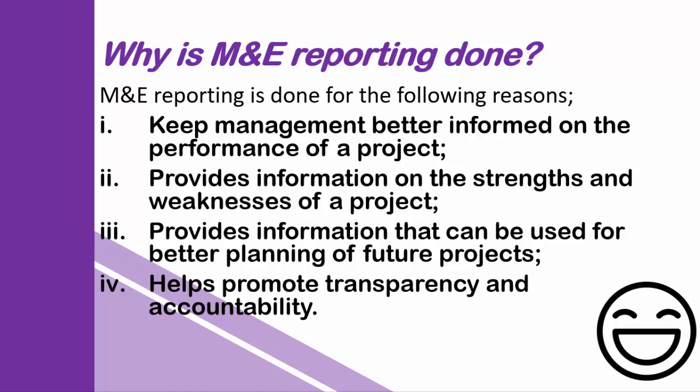Even as the project is running, changes can be made. And that is why I talked about the evaluations that are done in many of these projects. And some of these evaluations are done midway through project implementation. And the reason why they do it midway is because they want to be able to understand what they have achieved at that point. And if they are to achieve better, what can they do? What changes can they make? And then, as I earlier mentioned, these things are interlinked.